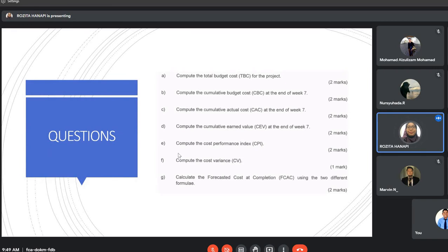Based on the first method, if for example the project cost efficiency or CPI is 0.90, and if the remaining of the project continues to be performed at the same efficiency rate, then the entire project will actually cost 1,005,555.